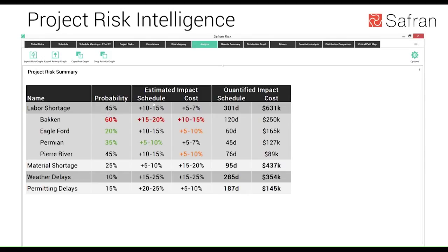An example here is that we're showing the organization has done their initial assessment. Across each of these projects, they've done their assessment. In some cases it's higher. We color-coded these to represent: red is worse than the initial assessment, green is better, and some are close, on par, or neutral. So here is their initial assessment. And then what we've done is capture those same qualitative results by doing what we call a sensitivity analysis by exclusion to really isolate the impact of those risks to the projects.